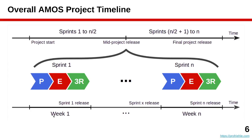Here you can see the overall timeline of an AMOS project. An AMOS project, like any Scrum project, is split into multiple sprints — a whole stream of so-called sprints. A sprint is a time box with a defined duration. That duration in AMOS is one week. Your work is split into one-week increments. Every week you will go through the basic Scrum cycle of planning your work, doing your work, reviewing and releasing, and doing a retrospective for process improvement before starting the next sprint.